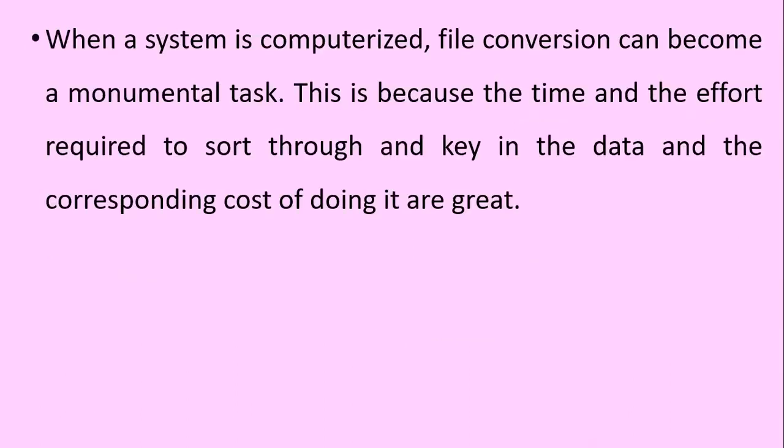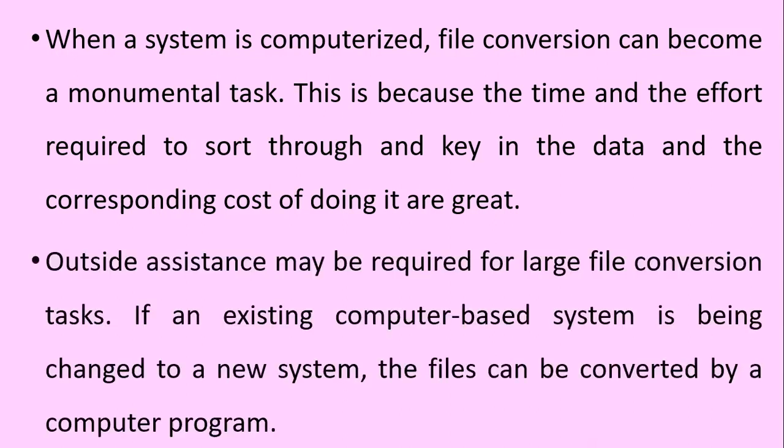When a system is computerized, file conversion can become a monumental task. This is because the time and the effort required to sort through and key in the data and the corresponding cost of doing it are great. Outside assistance may be required for large file conversion tasks. If an existing computer-based system is being changed to a new system, the files can be converted by a computer program.